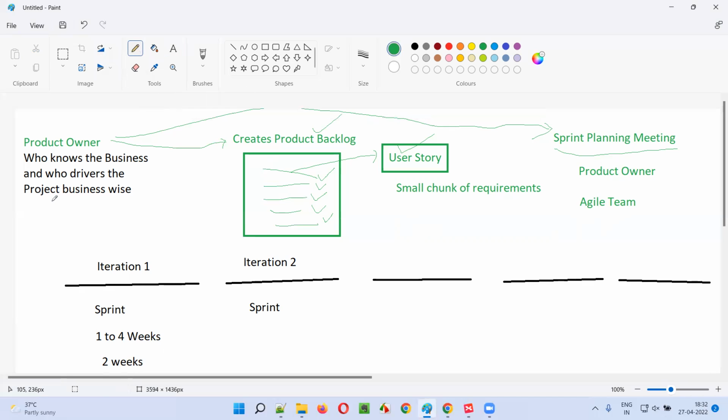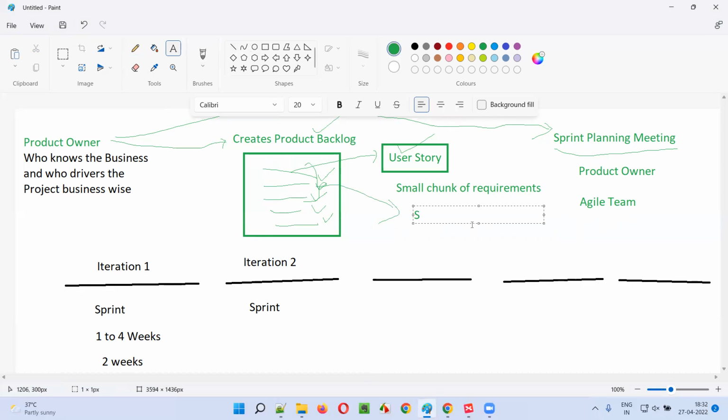The list of stories that are selected for a particular sprint, discussed in the meeting, and accepted by the Agile team will be assigned by the product owner to another backlog, known as the sprint backlog. This is the product backlog; there will be one more backlog known as the sprint backlog. So the user stories accepted by the Agile team in the sprint planning meeting will be assigned to the sprint.